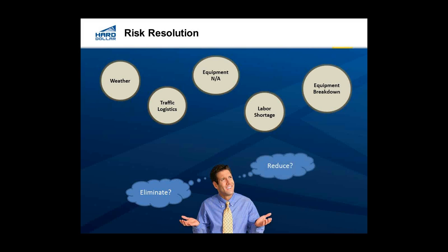So option number 2 is we look at it and say, well, how can we reduce this risk? And perhaps one of the best and most often used ways is to have some contingency set aside to be able to cover these unforeseen things that happen. So when that car went into the dig out and caused us to be unproductive, kind of set us back, maybe there's some contingency dollars that we had that we could dedicate to that. Now we also can plan ahead and have some contingency plan in place even before the project is underway. And that's what we put under the accepting it bucket. We're basically saying, you know what, we're going to put some aside because we know some things are going to come up. Accepting is the last resort. Reducing, probably the most common.